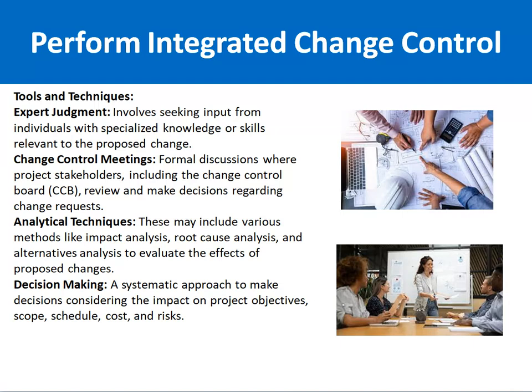Then the change control meetings. A change control meeting means a formal discussion, like in a meeting room, with the project stakeholders, for example the project manager from the vendor side, from the customer side, functional managers, and operational managers. They are sitting and reviewing the changes and making decisions regarding the change request.